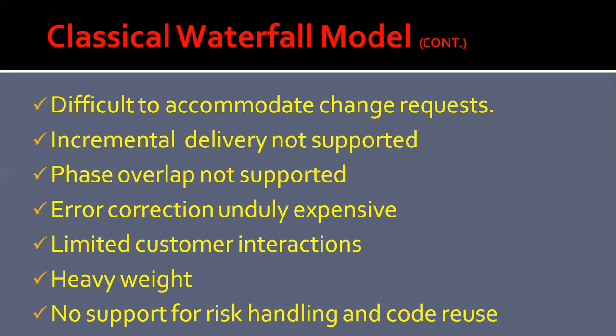And the third reason is that phase overlaps are not supported. We discussed this earlier. For most real-life projects, it becomes difficult to follow the rigid phase sequence prescribed in the waterfall model. By rigid phase sequence, we mean that a phase can be started only after the previous phase is complete in all aspects.